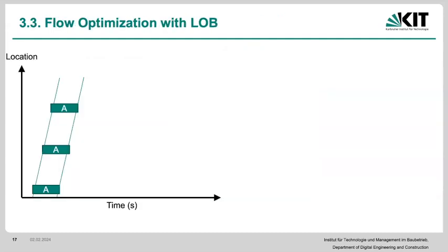So how can we do this? How can we basically look at this? So we have these activities. We have to know what we call a slope, which is flow rates, or sometimes it's referred to as production rate as well, depending upon how it is. Essentially, this is the slope. How many units are going to be carried out in how much time? Okay, that's basically that line that you're going to be seeing there, okay?